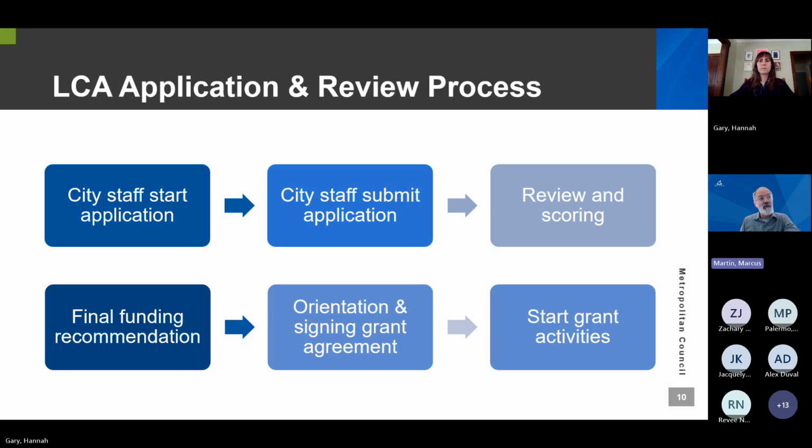As a project makes progress on the awarded activities, the project contractors will start submitting reimbursement requests to the city. The city will review and submit those to Kelly at the council, and the disbursement of those funds works back through the same chain. So from council to city, and if there's a sub-grant recipient agreement, from the city to the developer, and then to those consultants and subcontractors or general contractor.